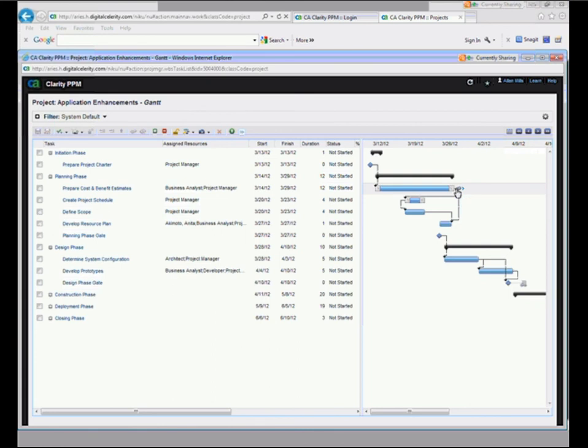In this case, I click on the end of one task and drag it to another task, and it's going to show me the type of dependency I'm going to try to create. In this case, I'm trying to create a finish-to-finish relationship, and it will kind of show me that until I drop it on there. And I'm not going to do that. I'm going to leave it as it is there. So this enables me to really be very interactive with my schedule, and then I can auto-schedule the items, and it would actually create my plan.